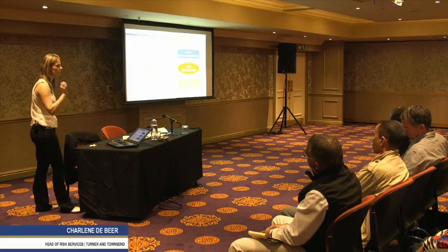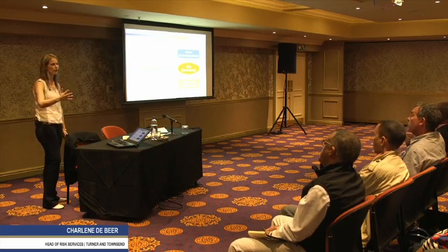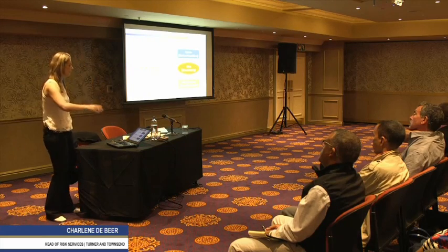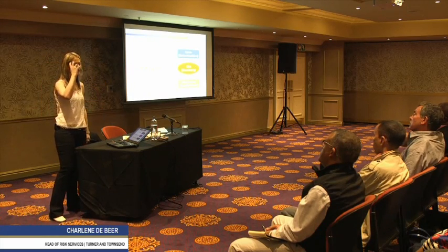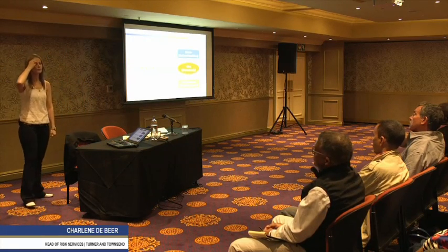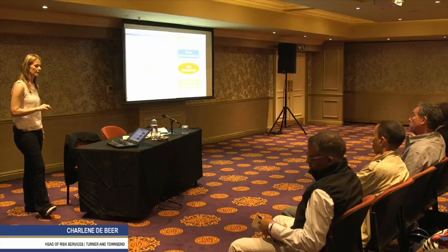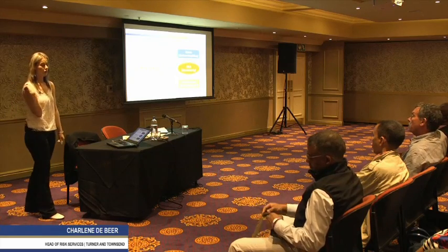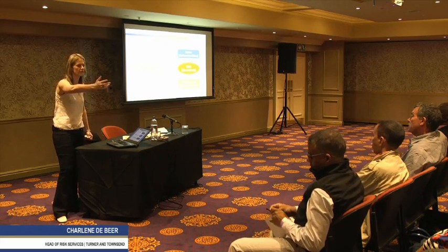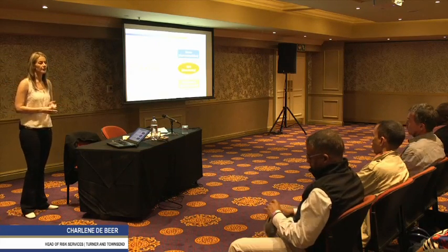And I think why nobody really can make that estimation is they had no design. No engineering was even done. They just had this picture in their mind, in the sense that the picture not being how it looks, but the idea that it had to be a multi-purpose opera house. That's all they knew. That's all Parliament knew. They just wanted to have a concert hall and symphony hall all together, 2 in 1, 100%. So I think what made it impossible to actually cost what it should have been is that they put it out to the architect and to the market and said, we want a multi-purpose opera house. You come and tell me what it should look like. And then it's free range.